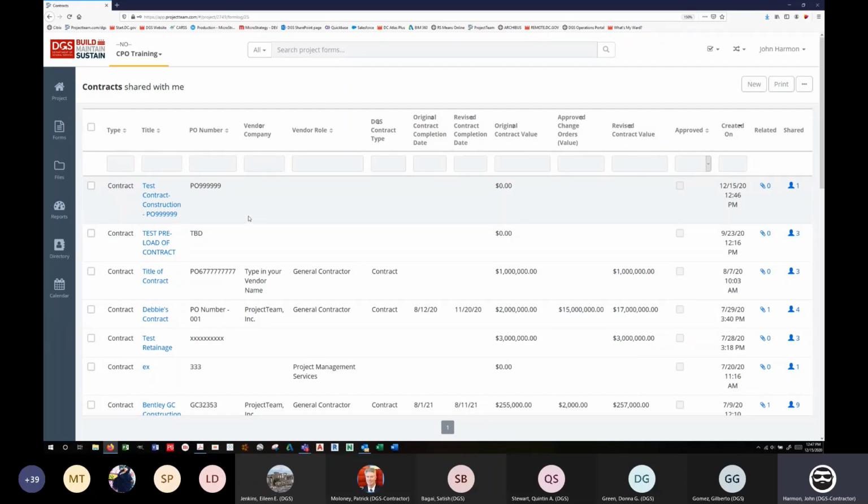The same goes, excuse me, with multiple PO contracts. All right. If your vendor gets awarded a contract and it's split between two POs, because let's say there's capital funds and operating funds on the same contract, and in the initial award, you get two POs. Enter the contract and take the lowest numbered PO, because usually they're consecutive numbers. That's your contract. The second PO is going to be a change.